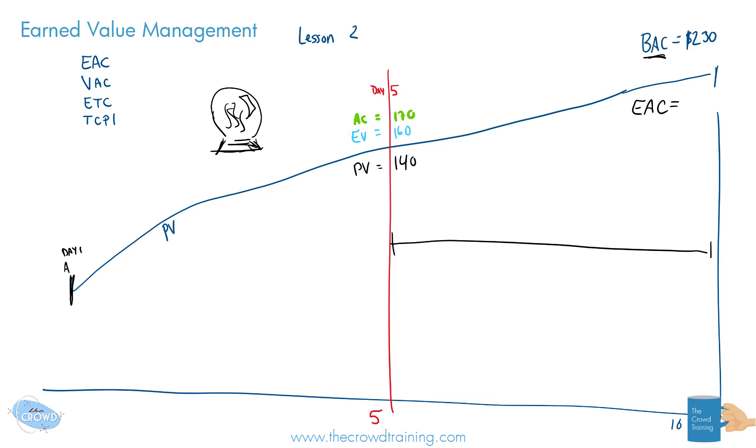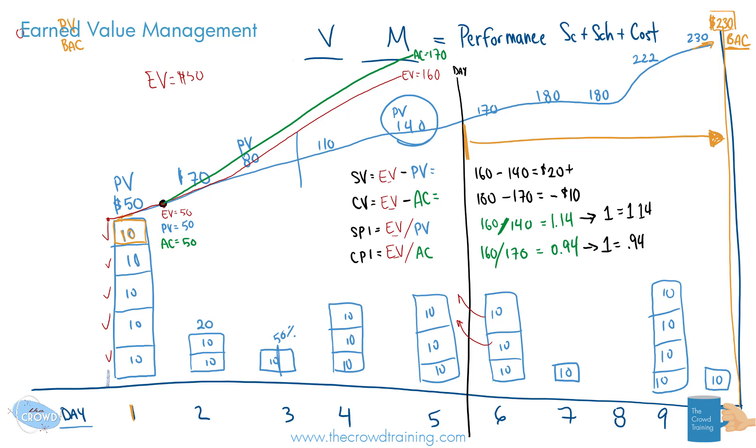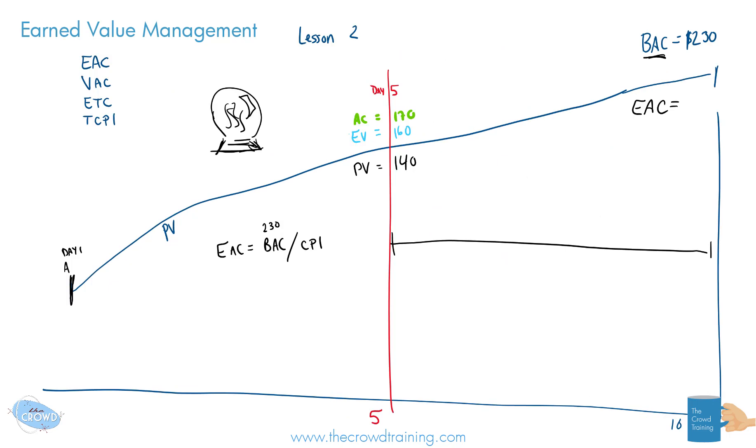A couple of these could be your estimate at completion could be your budget, which in this case is $230, divided by your cost performance index. Now, the cost performance index we did before, and that was here, about 0.94. So that would be divided by 0.94. Since I'm just using fudgy numbers, this may not work, but it could give us a result.